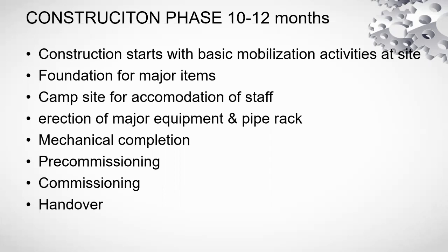So the construction phase starts with basic mobilization to the site and foundations of major items like columns, turbines, and other heavy items like pumps, etc. Then the campsite for accommodation of staff, which is also done at a very early stage. Erection of major equipment and pipe rack, yes.